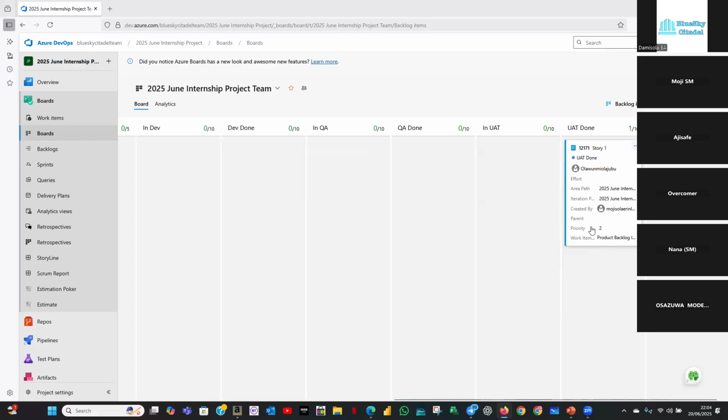So if I notice a task that has to do with automation on it, and it's not closed, and I'm checking with the QA, and the QA said, oh yeah, we've not done automation on it, we'll carry it as maybe tech debt and all that, they need to create a story for automation on this particular story so that they don't forget. So that's part of why, as a Scrum Master, you need to check that everything has been done on it during stand-up.